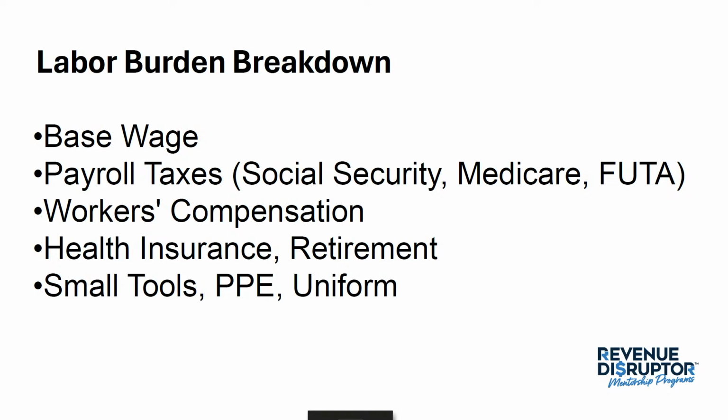So if you recognize that you've hired a person to work for you and they're a W-2 employee, you have to pay payroll taxes, right? If you are not factoring in that cost, you're only factoring your base rate. That's what we call an unloaded or unburdened rate, or a raw rate. All these terms are synonymous: raw rate, unburdened rate, base rate. But we want to add our burden to it, so it's a totally loaded rate. We are capturing all the other indirect costs associated with having that employee.